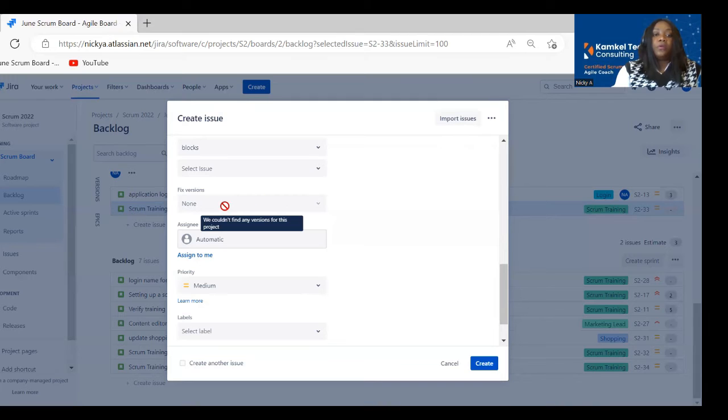It's really important because sometimes it's easier for you or your team members, in case they want to identify all the stories that are going to be part of that release. One way to quickly identify them is by just looking at the fixed version. When you click on the fixed version, it will pull all the stories that are going to be part of that release. So again, a fixed version is something that your tech lead should help your team to create.